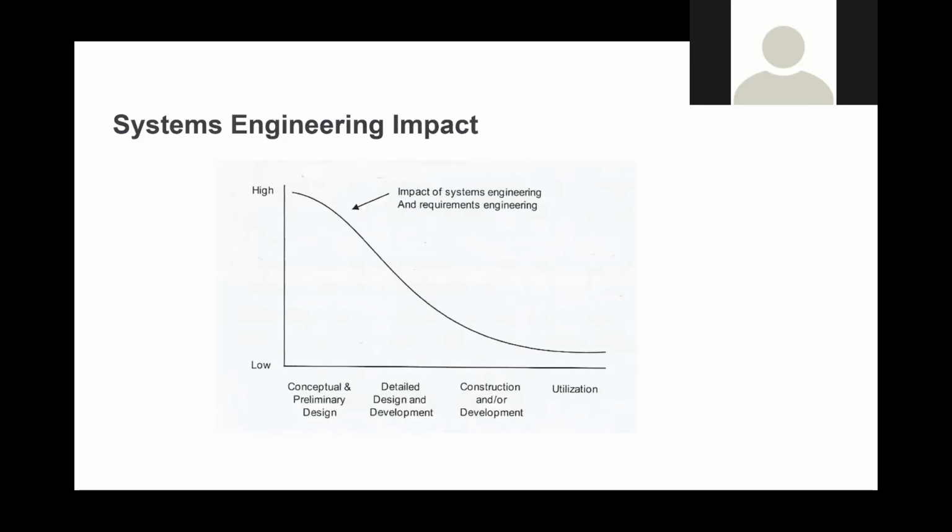Lastly, why systems engineering is important. The curve that you can see on your screen highlights that on the y-axis you have the cost, and on the x-axis you have the life cycle. The upfront cost of systems engineering, identifying the right requirements, flagging them in the right manner, documenting them in the right fashion, clearly articulating them, making them tangible, trackable, traceable and quantifiable, is important, and that takes time and energy and some informative design. If you do that upfront, that is a good cost.